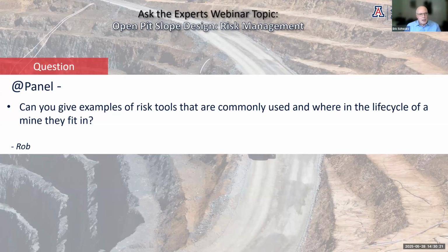So I think that's a tool that should be stuck to very strongly, that geotechnical involvement for projects through the life cycle from conceptual to pre-feas to feasibility, really push for high confidence in geological models, geotechnical models, and hydrogeological models. I think that's a great example of early in the life cycle.